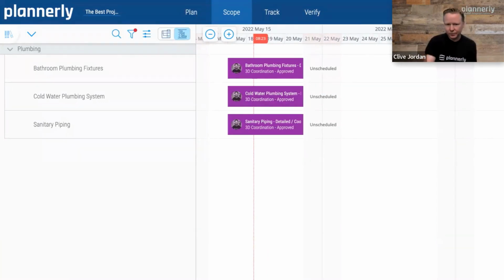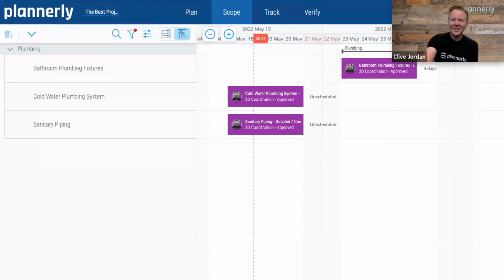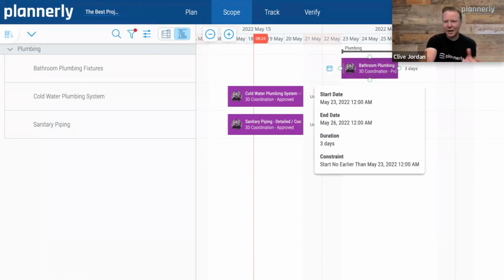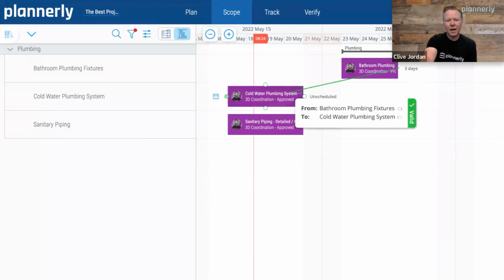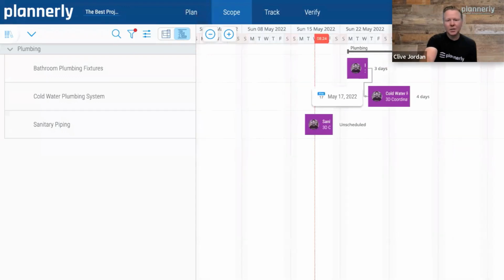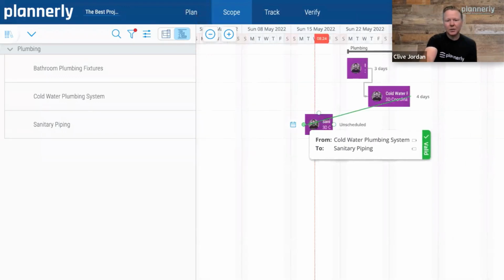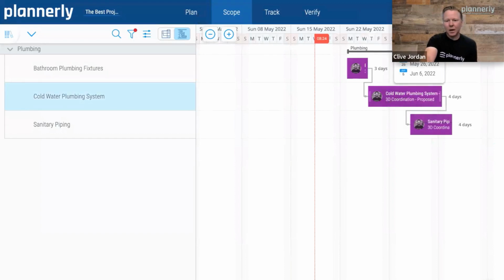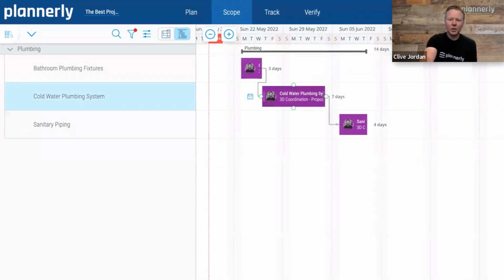So if I take my hands off the wheel, would you be able to maybe, yeah, okay, perfect. So this is a live view of the timeline. Everything that people are doing is updated in my view so that you can see what's happening without it just looking like complete magic. If I hover over a task, you can see the nodes that I can grab from so that if I click and drag, I can start to create dependencies, and those dependencies will update the tasks and will create us a critical path. And by updating these tasks, we are simply showing you how easy it is to make those updates and changes. So everything that I'm doing, everything that Louis is doing is all being updated automatically.